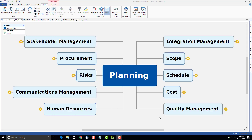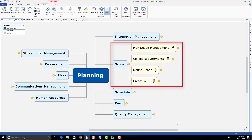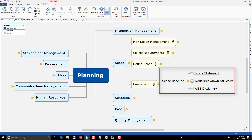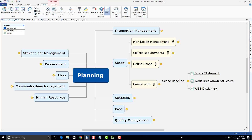I'd like to focus just on scope and give you some examples of how I'm using this Mind Map to present the content in this class. I'll also demonstrate the features of the Mind Mapping software as I demo the scope management process. I've expanded scope, and you can see there are a total of four processes: plan scope management, collect requirements, define scope, and create WBS. If I expand create WBS, you can see one of the key outputs is the scope baseline. Remember, the scope baseline includes the scope statement, the work breakdown structure, and the WBS dictionary.